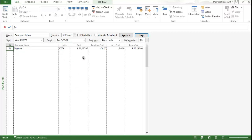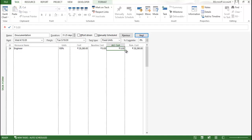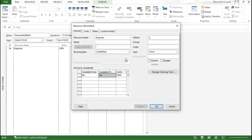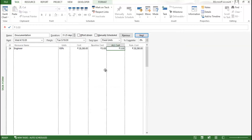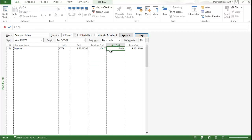So now you can see this particular task is having a resource of the engineer which is 100% utilized. The 28,280 rupees is a cost which is budgeted. Now, let's put the cost here. So, you can see still it is not editable. Still it is not editable because we have not done any settings.